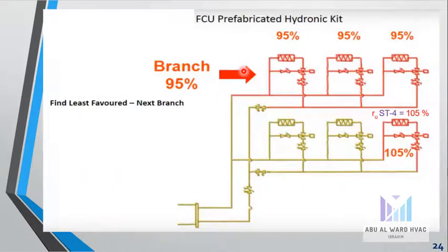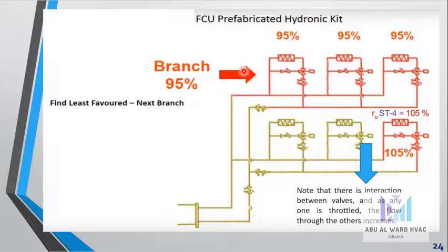We will go to the next least favored circuit in the next branch. Note that there is interaction between branches: when any one is throttled, the flow through the others increases. In this circuit we have 105% because of throttling the previously balanced circuit.